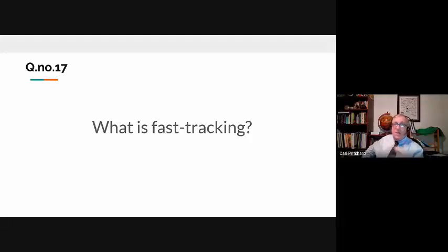Because yes, we can keep stacking things up and doing things in parallel, happy day, but the real challenge is they're going to drop the ball. They're going to make that mistake. They're not going to be able to keep up with all of it. And if they are realistic about it and say, yeah, I can fast track, but you need to understand the chances of the ball getting dropped at some point along the way increase dramatically. And it's going to suck up more time for me as a manager because I'm going to be spending time transferring from one task to the next task to the next task to the next task. That's also going to be a big part of the challenge here.